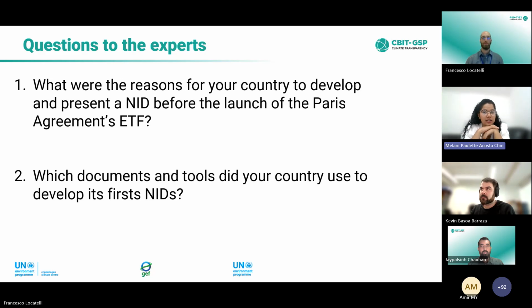And that was really easy for us, and it was a lesson learned, because for the inventory we prepared for the second BUR, we lost a lot of information when the institutional system here in the ministry changed. We changed software, and in that change we lost a lot of information. So now we have a cloud separate from the institutional base, and that helped us a lot. Each sector has their own account, and the coordinator has another one. So the coordinator has the big picture, and the coordinator of each sector has another account. That helped us a lot.